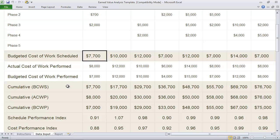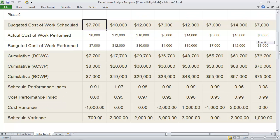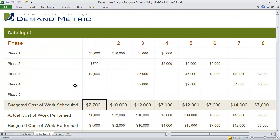The cumulative BCWS, ACWP, and BCWP will automatically be calculated here in addition to the schedule performance index, cost performance index, cost variance, and schedule variance.